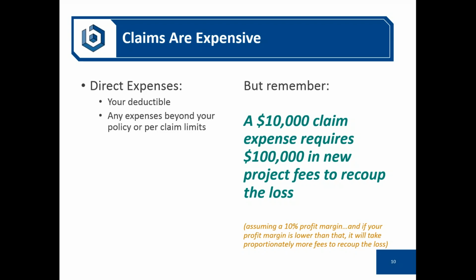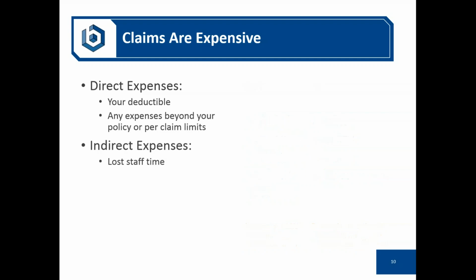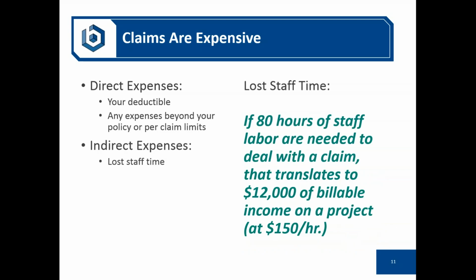If you're a larger firm with, say, a $100,000 deductible and you go through that type of expense, that's going to mean the firm's going to need to land a $1 million fee project and run that at a 10% profit in order to recoup that expense. So it's very costly.